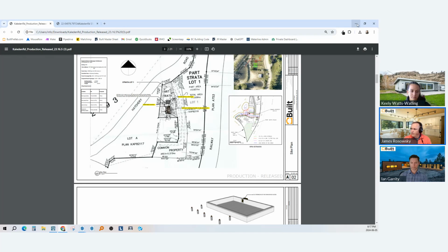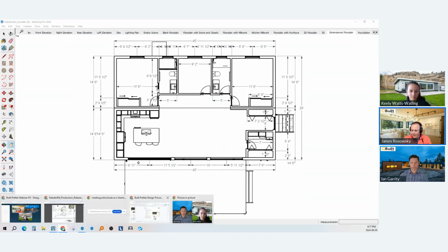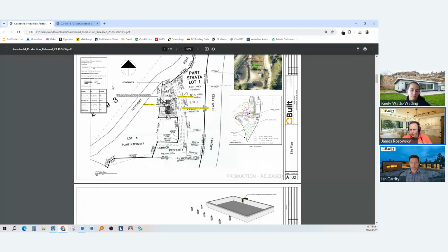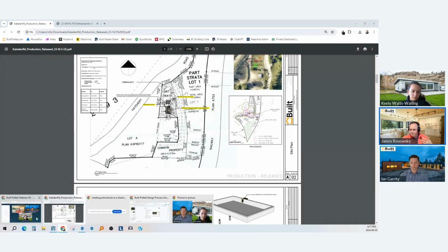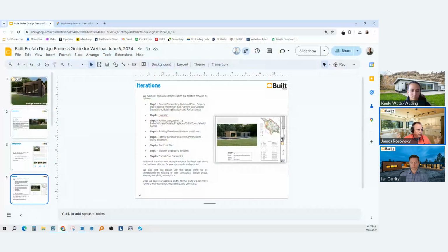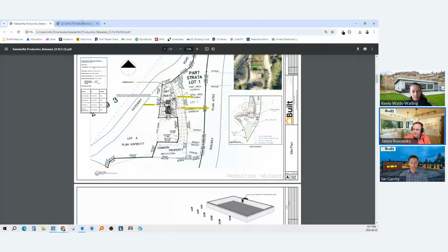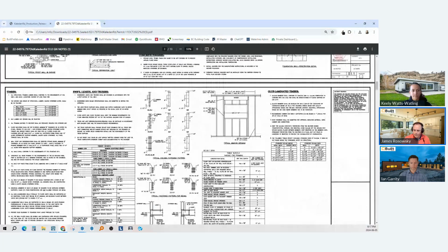And then of course, beyond that, we have to take these plans and typically work with other third parties on your plan preparation. So we can't just submit your permit plans and say that's good. Most municipalities are going to want us to submit engineered drawings along with possibly geotechnical information, mechanical, you name it. So again, I'm skipping over a million things here in a really quick amount of time. But for instance, I have pulled up the engineer drawings from this actual house.